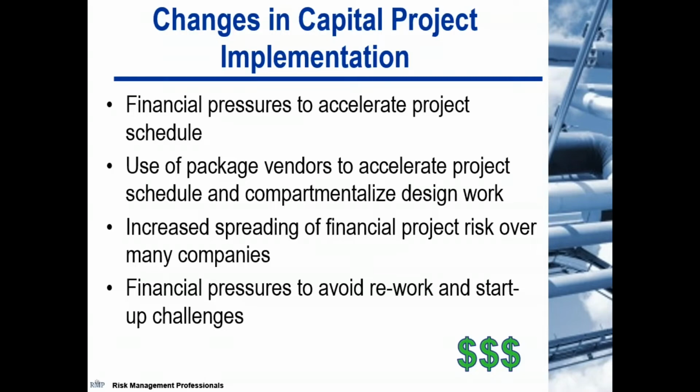There's an increased spreading of financial project risk over many companies. It's more common now to have many different companies invested in a capital project to kind of spread that financial risk. It does spread the benefits too, but it's a common practice right now. And the more companies that you have in play and involved in a project, the more there's a need for remote collaboration. There's also a lot of financial pressures to avoid rework and startup problems. You don't want your commissioning phase to turn into more of a nightmare than it needs to be. All those things drive the need for communication early in the capital project, and these financial pressures have been driving increased application of the software capabilities that are out there.